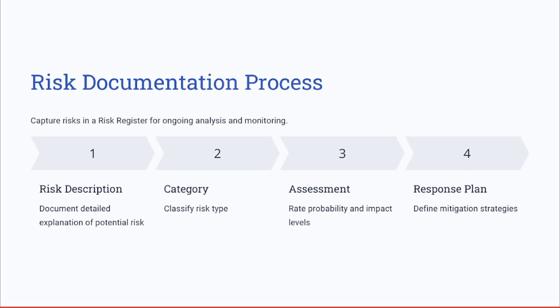So when you analyze this risk register, you will have a very detailed risk register, including all of the risks that might happen on the project with their probability and impact. Let's say when doing the qualitative and quantitative analysis, you assign a value for each of these risks. You assign the roles and responsibilities, who's going to handle what. This will be the overall risk register of the project.